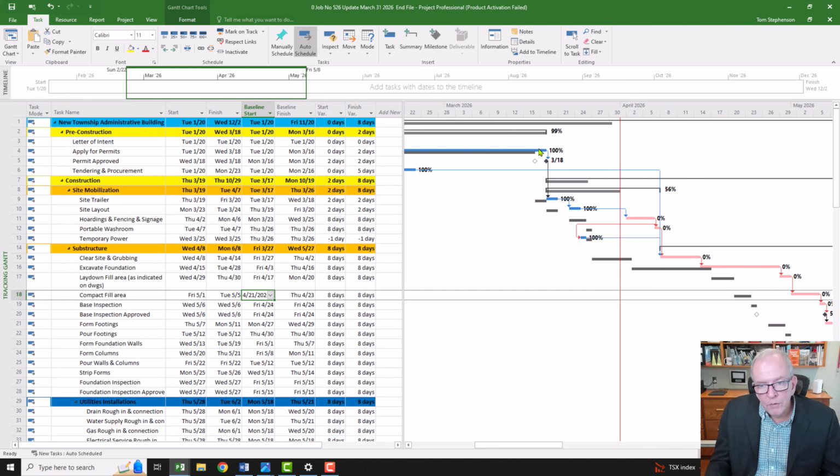And I really want to emphasize with the checklist, you want to follow from earliest to latest so you don't get something up above blocking the movement and the flexibility of the critical path. You want to see when something takes longer, if it's pushing stuff, or if it's pulling stuff back, if it's taking shorter. So that's the purpose of the checklist. Really trying to be careful that we've covered the main items in this process.